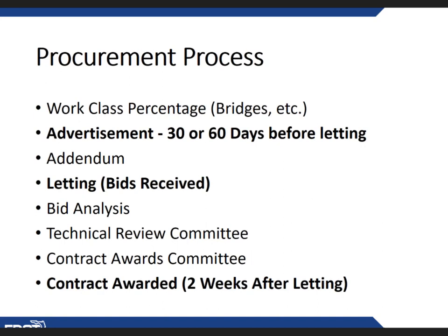And we have to consider the work class. That is, what pre-qualified bidders do we want bidding on this particular project? If it's a bridge painting project, do we want a roadway engineer bidding on it? Well, we might. It all depends. But it depends. We do have to do work class percentage reports. So again, we want to make sure that we advertise to the correct group of people.